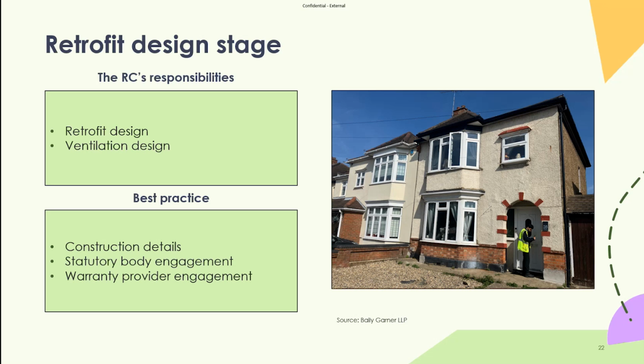We've also, just slightly off the screen, can clearly see that there's an attached garage which actually attaches to the neighbouring property, has an asbestos roof, is a real constraint and challenge associated with EWI to that elevation. So how are we going to install EWI to that area? Do we need to think about party wall constraints? All of those sorts of things need to be thought about in the design. Because again, if we have a poor design, things often get made up on site, and that's when things go wrong.